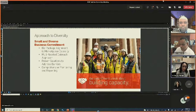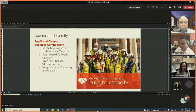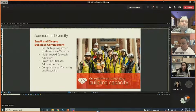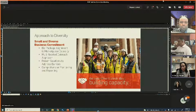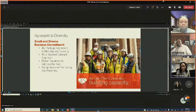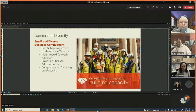Their approach to diversity is to break bid packages into smaller packages aligned to marketplace capacity, giving smaller firms an opportunity to bid work they might otherwise be unable to pursue due to bonding or manpower capacity limitations, thereby reaching a broader subcontractor community.